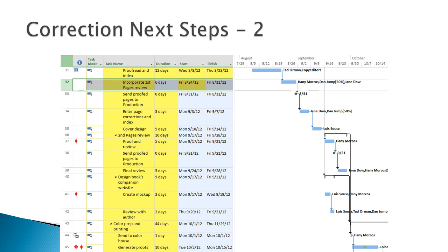The last actions made a larger improvement, and you have pulled back the necessary task, 45, about halfway. Continuing down the list of tasks, you notice that tasks 34 and 35 appear to be independent, and they have different resources. So you confirm with the resources that their work is indeed independent and can be performed in parallel, an example of fast tracking.